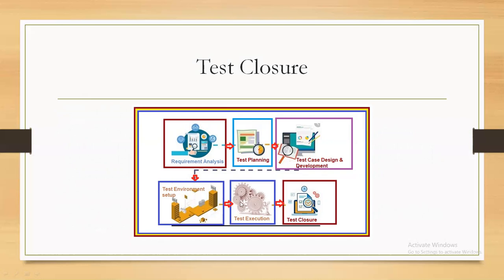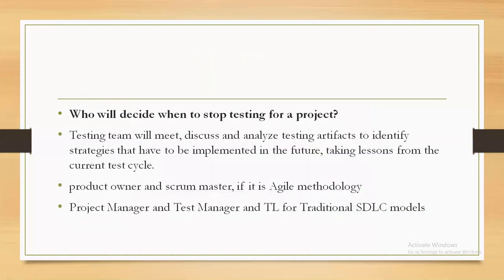Test closure activity comes after requirements analysis, test planning, test case design and development, test environment setup, and test execution. So the phases are: requirements analysis, test planning, test case design and development, test environment setup, test execution, and then test closure.